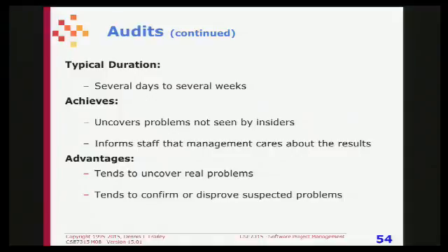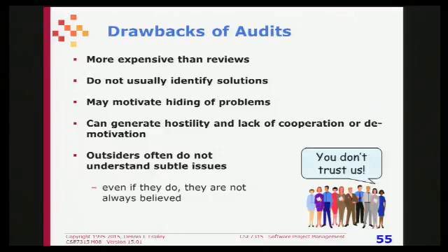Audits tend to uncover real problems and to confirm or disprove suspected problems. So they're usually used to probe more deeply than the conventional reviews I already mentioned. The drawbacks of audits are that they're expensive. They only identify problems. They don't necessarily identify solutions. And again, they may motivate hiding of problems. And if you don't handle them right, they can generate hostility.